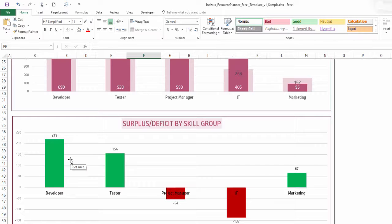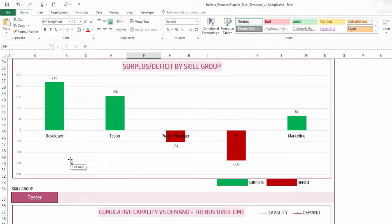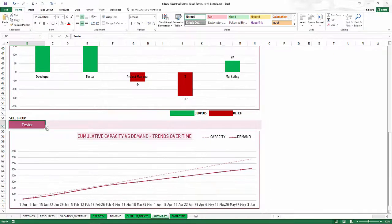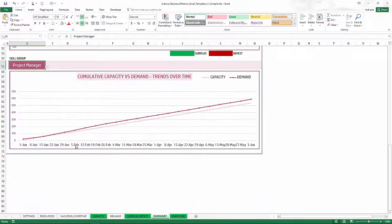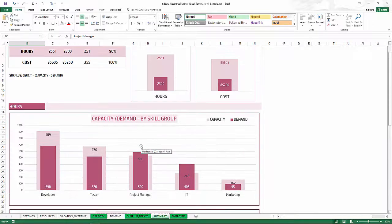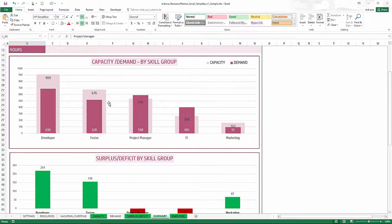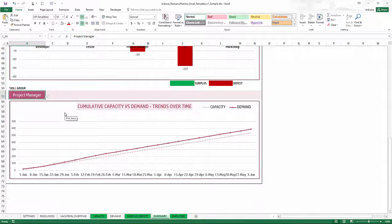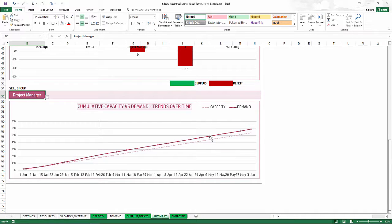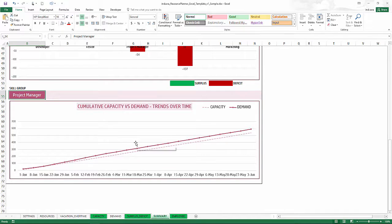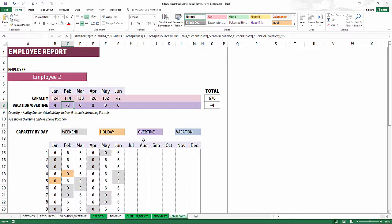The skill group chart lets you choose a specific skill group and see capacity versus demand over time. This is important because cumulative totals may look fine — for example, a developer surplus overall — but the extra capacity might be concentrated in a certain time window. Looking at the chart over time, you can see that initially capacity and demand lines are close, but as time goes on demand increases while capacity doesn't keep up, revealing a time-based dimension to these metrics.